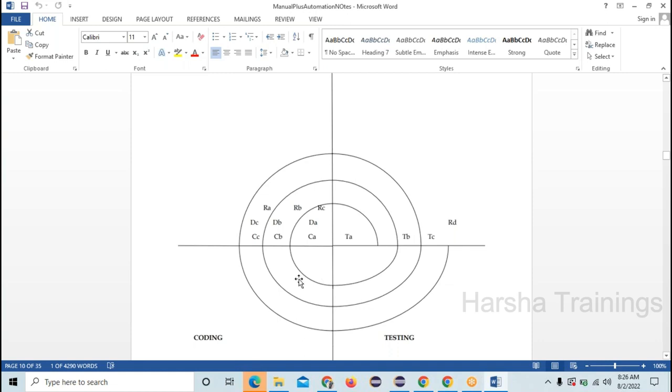After completion of the testing of B, you need to test A plus B again. You integrate the A module with B and test again. Now AB is done, right? After the C module is developed, with coding and testing done, you integrate AB with C and test it. Similarly for D also.